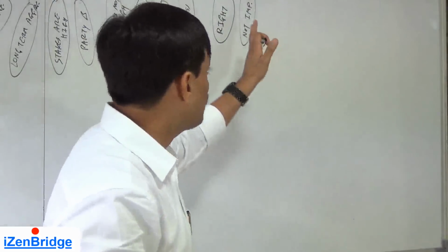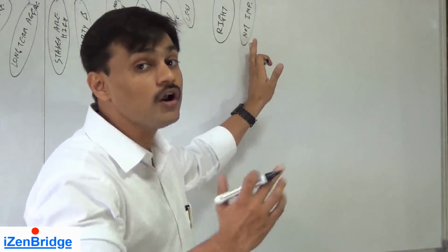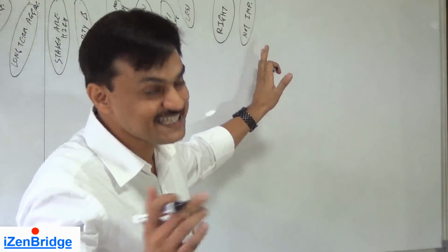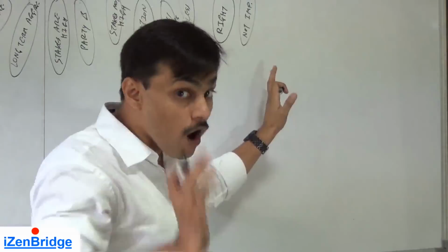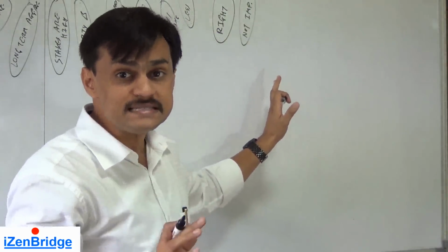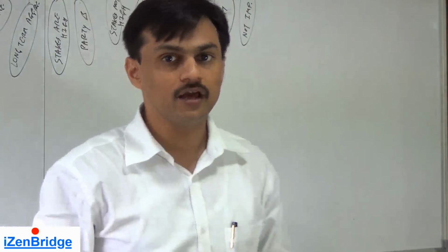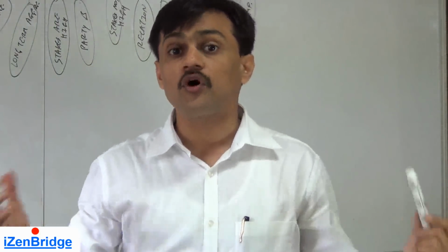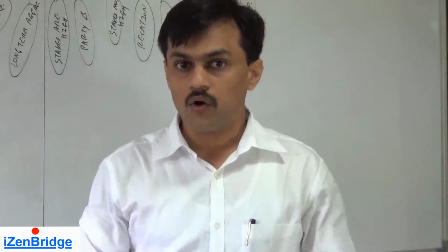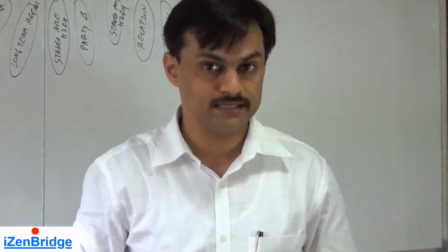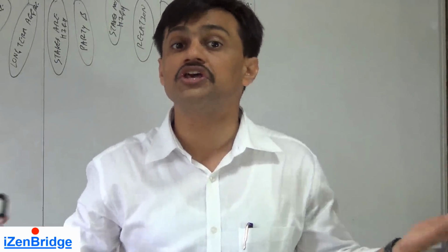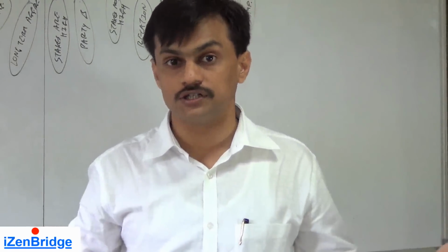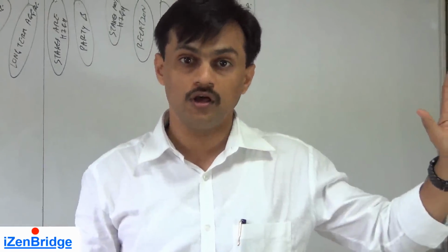So you may apply a forcing technique when you have a conflict, especially with vendors, where the relation is not that important, he is not your team member, or you are in a state of emergency. You might know many developments or projects got delivered in exceptional timelines during the World War. So if you are at war, you may not care about the feelings of the other, you just care about the goal.